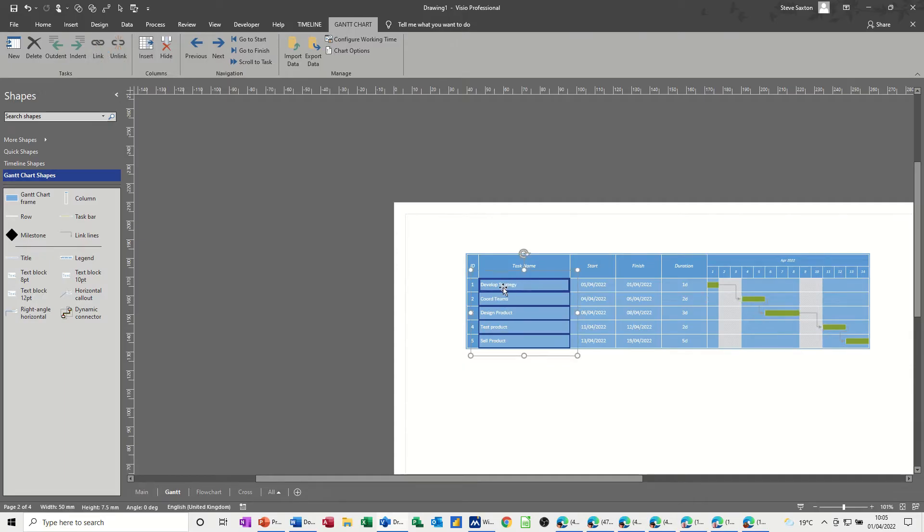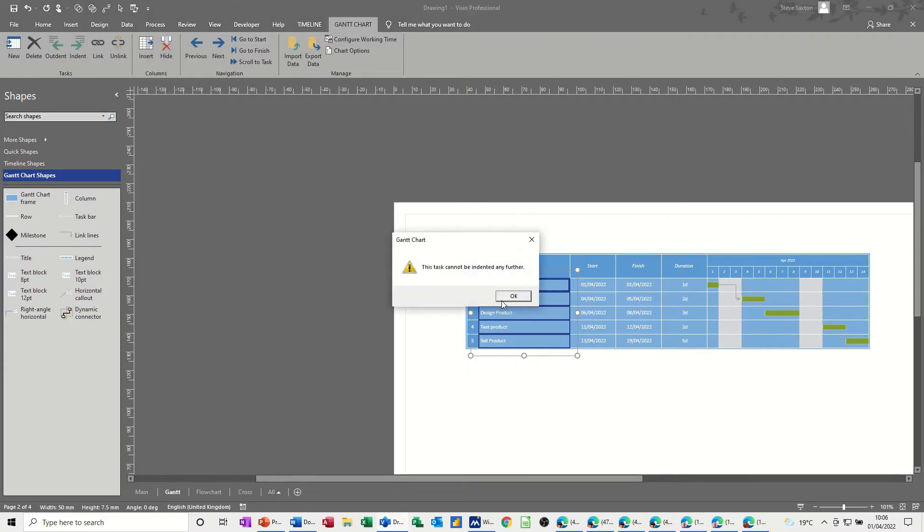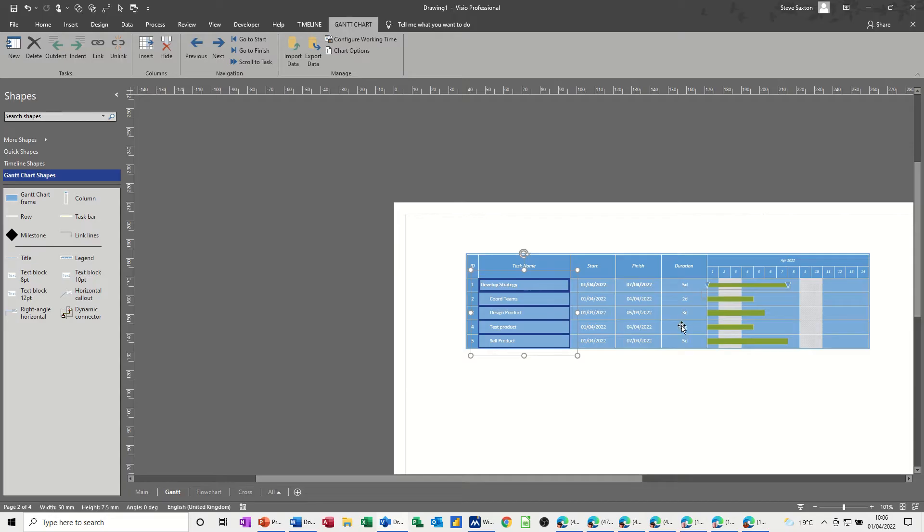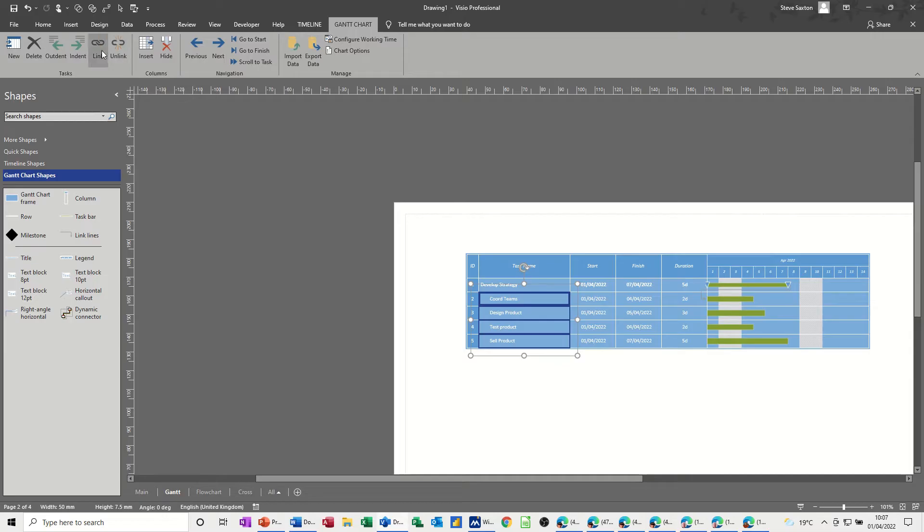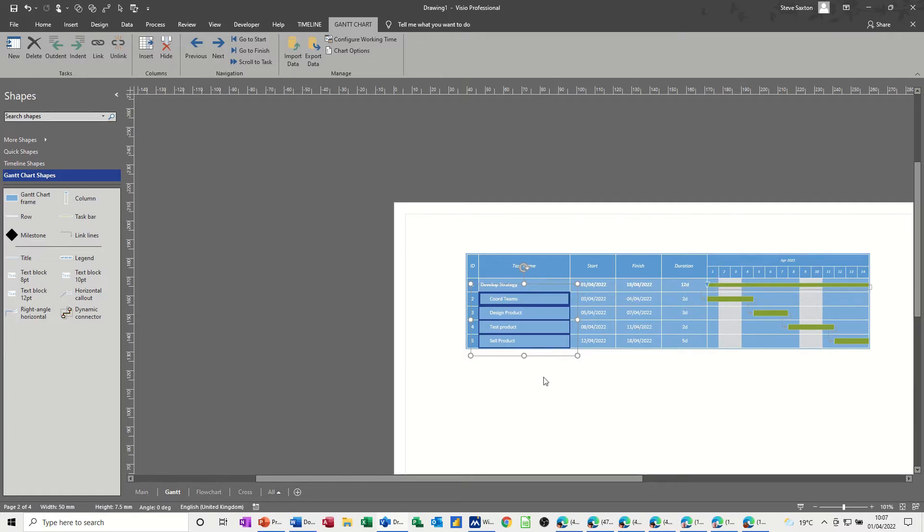So that's a title, so I don't want it like that, I want that to be a summary task, so I'll just do that, just need to indent that. It tells me it can't indent it, but it does, and now it's giving me the summary. So that top one now becomes a summary task, and the whole project is 12 days in duration. So that's that one.